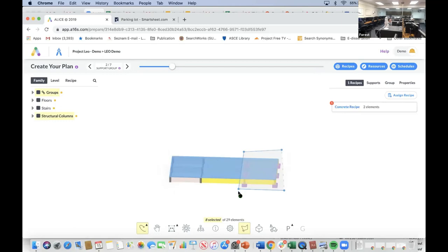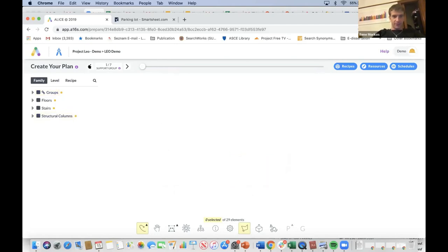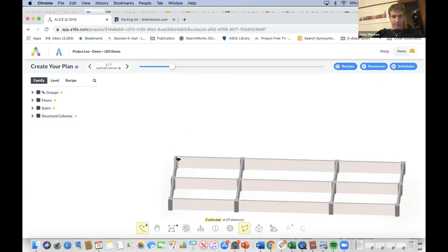While you're doing that, Rene, let me ask the class a question real quick. So I'm doing it because I've been trying to hide something, which is these little columns in here that are super annoying. But here's what I'm trying to do. You see these guys? Yeah. They weren't selected. And so if I attach a recipe to them, it's going to think that you need a day to do each one of these columns, which is not the case. Got it. So I was kind of cutting a corner, and now I'm paying. So basically what I have to do...